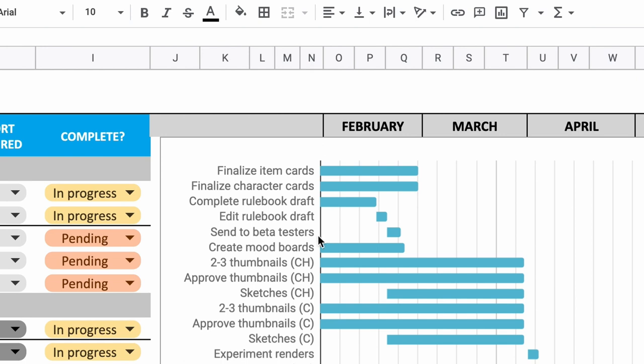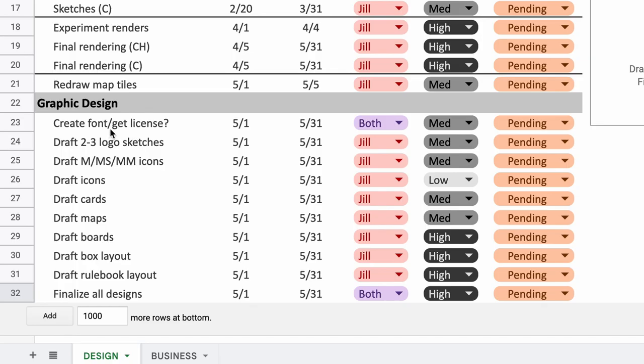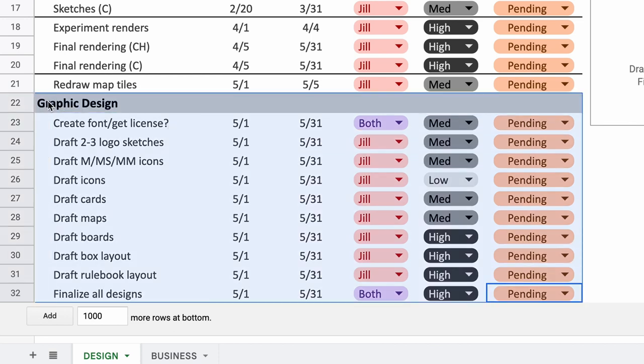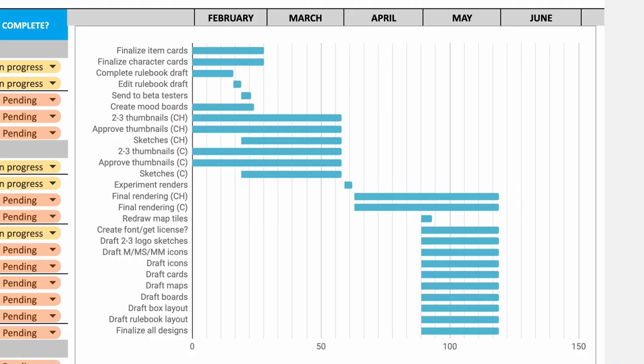We've eliminated the entire month of January because that has come and gone. We also readjusted the priority level for certain blocks, namely graphic design. As you can see in the calendar, we've pushed all graphic design tasks into April and May since illustration is at a higher priority.